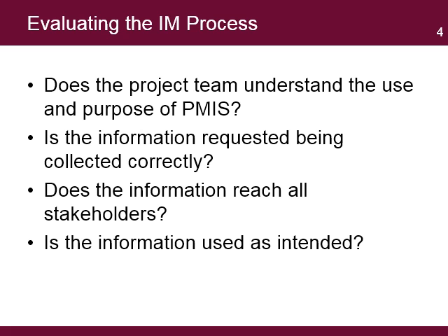To maintain the effectiveness of the system, the project will need to make periodic reviews through the life of the system. The evaluation is a validation of the system, and it's an opportunity to review the process with other project stakeholders. As part of the validation, the project will need to answer the following questions. Does the project team understand the use and purpose of the PMIS? Is the information requested being collected correctly? And does the information reach stakeholders? And is the information used as intended?